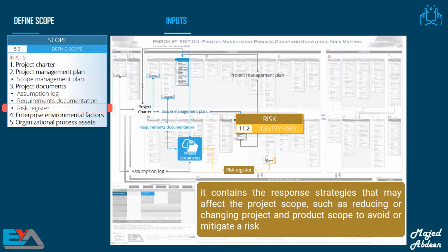Typical responses to risk situations include: for threats, our responses are to escalate, avoid, transfer, mitigate, or accept. For opportunities, our responses are to escalate, exploit, enhance, share, or accept. Sometimes you need to make contingency plans in case an event or problem occurs in your project.